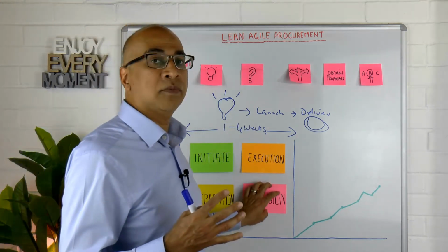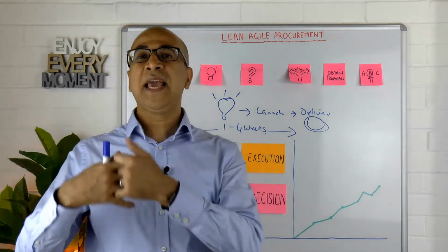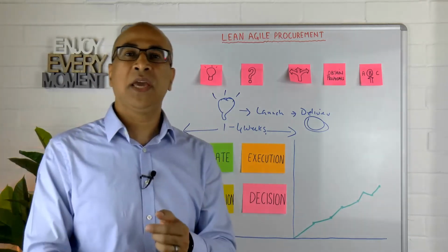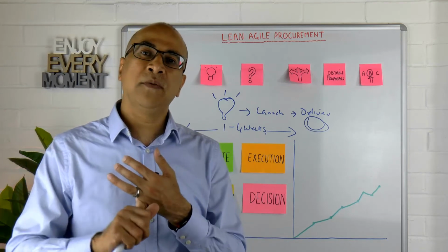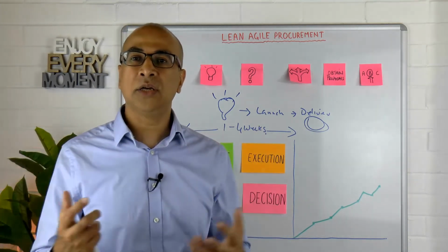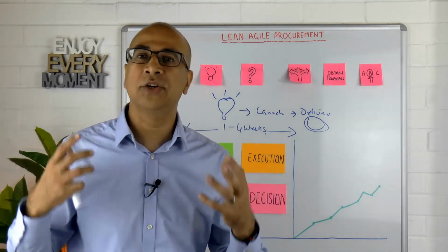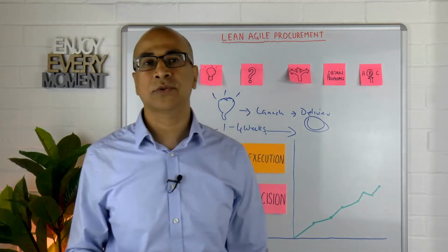But you still need to make that decision now. The outputs from the big room planning event help you to make that decision. You take the vendor behavior into consideration. You look at their performance. You look at the way in which they were able to collaborate with one another. You look at the cultural aspects of things, how they treated one another, and you see what makes a good fit in terms of your vendor as well as your solution.